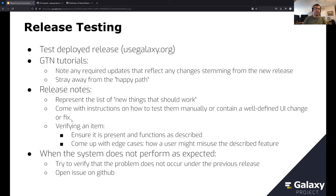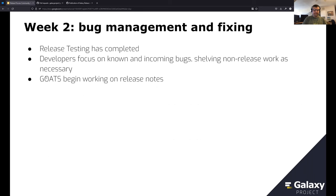Another candidate for manual release testing is PRs with a well-defined UI change or fix — we verify the item is present, that it functions as described, and we try edge cases for what a user might do accidentally. When the system doesn't perform as expected, ideally we verify that the problem didn't occur in the previous release, and in any case, if it's a problem we open an issue on GitHub and tag it appropriately.